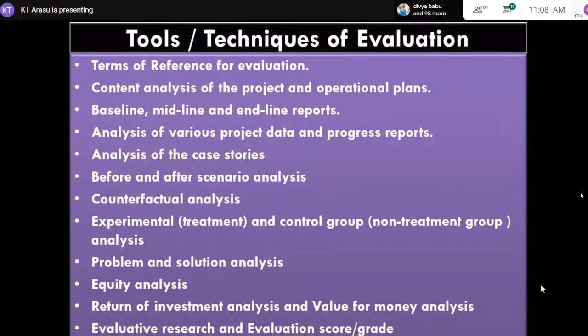Now many agencies are interested in experiments. Experimental is a treatment group. Suppose the project is a treatment that you are using in some area. We have implemented it in 4-5 projects, in a European Commission assisted project. At the beginning stage benchmarking was done, and the control group did the same thing we did while benchmarking or conducting the baseline. Then the project was implemented. Then at the end of the project, we internally as well as the third party evaluator used to measure the treatment group as well as the control. So the comparison is possible. That is the advantage of this.